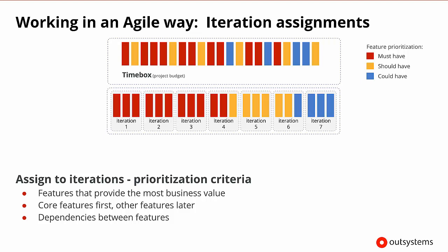After the must-haves, we determine the things we should have, and then finally the could-haves, which are also referred to as nice-to-haves. While prioritizing, we should also take into account any dependencies between features. This may potentially raise the priority of less important features.